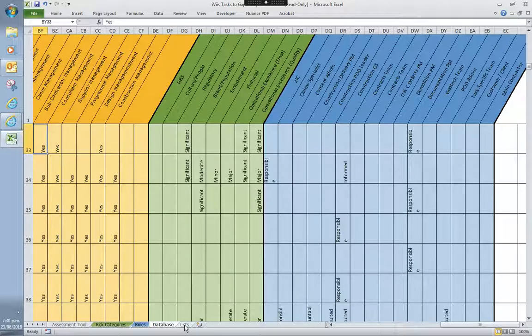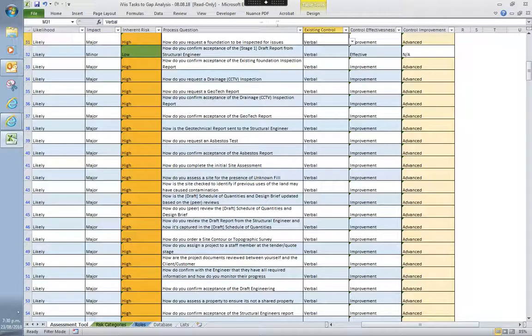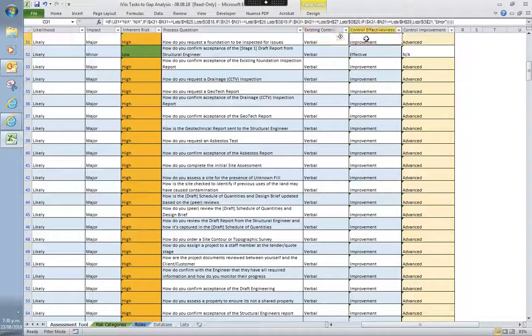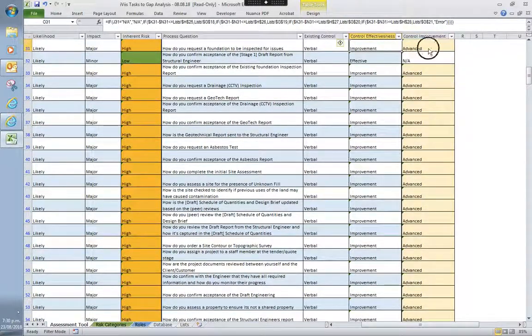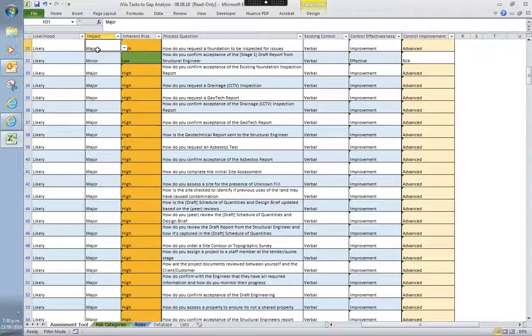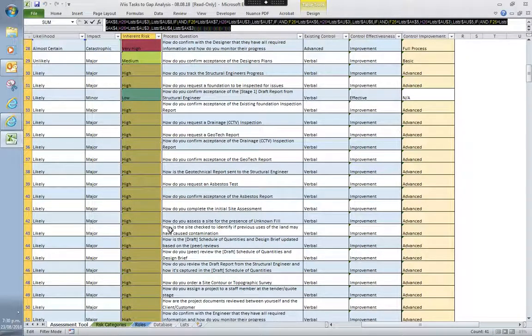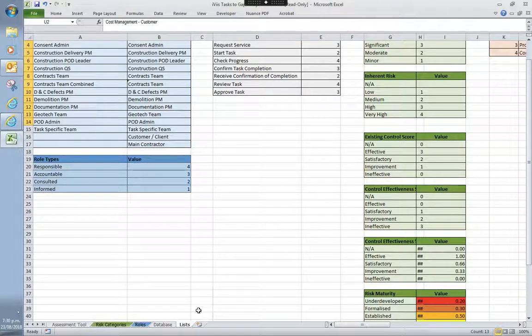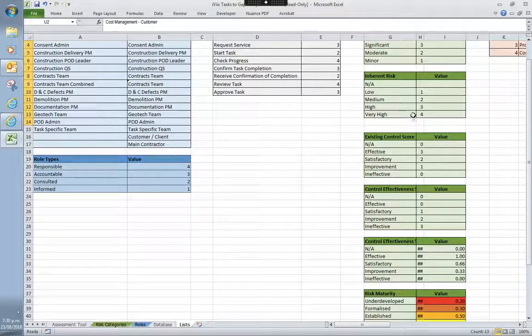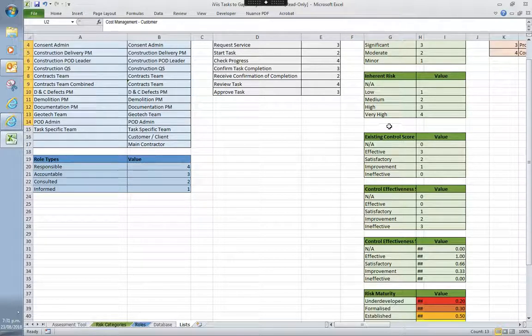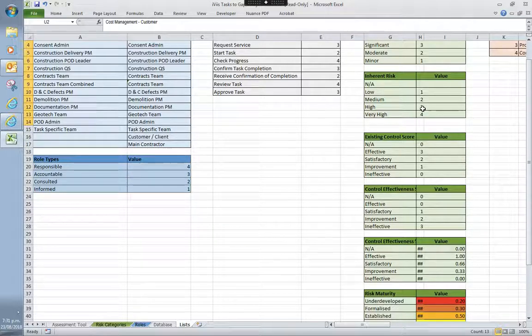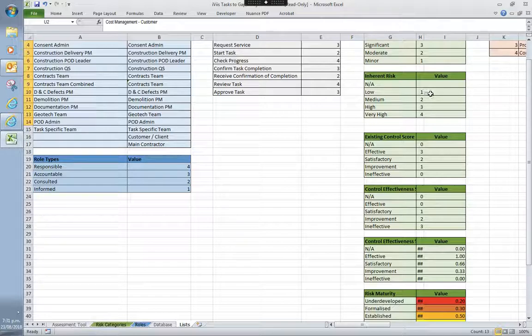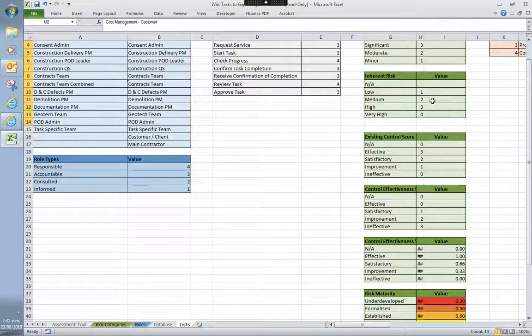Then the maths and everything that works in behind it, which I'll give you a quick preview. Let's grab that. So there's some very long formulas running in the background. And I've got all the explanations of those, how they work. But all those run, it's all dynamic. So it's running on a score-based scenario. Currently it's all run on a 1, 2, 3, 4. But as life tells us, project management tells us, that a very high risk quite often isn't just one more point higher than a high. This could be running in a bell curve. So it could go 1, 8, 16, 32. So all that sort of stuff.